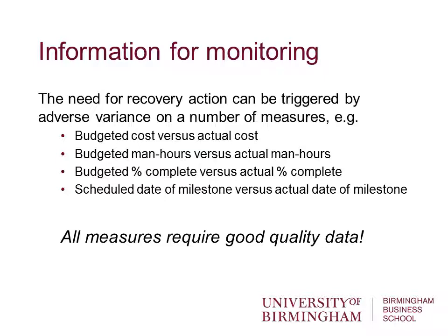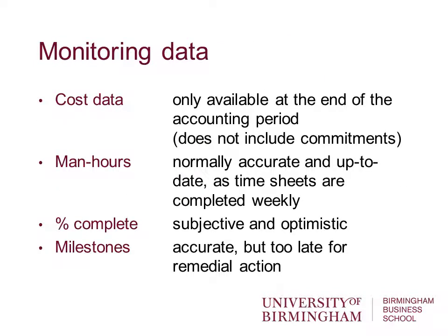Okay, so all measures require good quality data. So one of the key factors once the project commences is to have some people, or maybe the project manager, collecting good quality data which they can use to monitor the progress of the project. Some of the issues around the data: cost data is normally only available at the end of each accounting period, so often isn't in time for reasonable action to be taken.